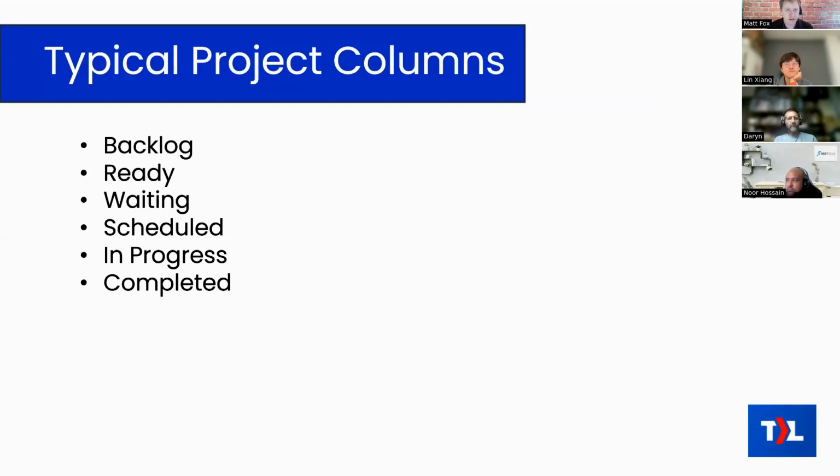It really depends, because sometimes you create a project, especially if it comes from a project template because it's the sort of project you do over and over, and you're going to get all of the tickets for that project all at once. But you're not going to actually do all those tickets all at once. So if some of them sit in the backlog column for months, that's okay. Obviously, that doesn't work at all in the service environment. So that's one big difference. The backlog you use as a holding place for tickets that you don't expect to do immediately.